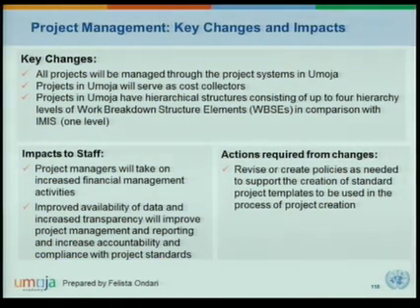So this project structure gives you the programmatic breakdown of your expenses. In addition, you also can get the breakdown by the type of expense, for instance travel, staff cost, training cost. So you have all of this kind of breakdown. Going back to our example with Spain, if you would like to know how much money I spent on staff, on non-staff, on training and so on, then you can break it down like this in those project structures. And from my definition, the project manager is the one who is responsible for the project delivery and for the resources, in order to complete the project in time and in budget and to manage those resources accordingly.